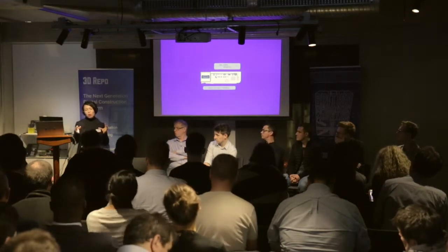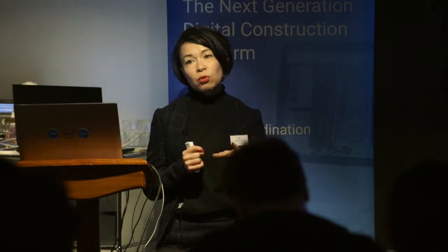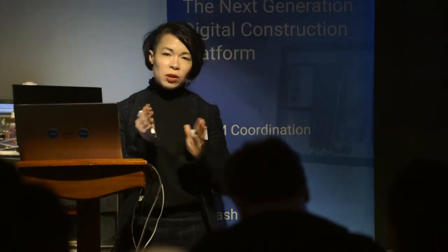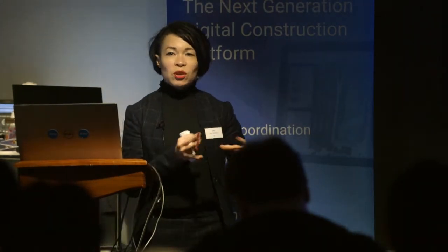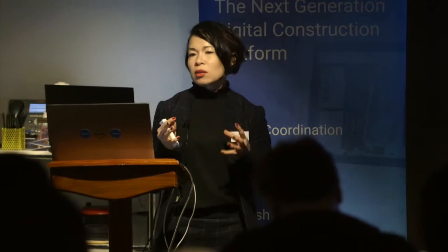To give you an example, slightly off topic, but a model consists, as you know, of objects. You can pull data, you can create data from the model. You will only ever have a license for the objects if you're getting them from manufacturers. Most government contracts now require you to assign copyright in your models to the client, but you don't actually have that right with regard to objects, unless you split that out within your contract. You're immediately in breach as soon as you sign it, because you're promising to give something you don't have. And in the same way, if you're talking about files within the BIM process, it's working out where they properly sit.